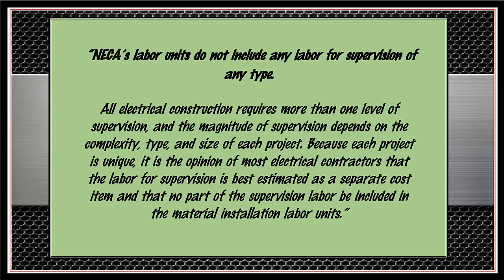Because each project is unique, it is the opinion of most electrical contractors that the labor for supervision is best estimated as a separate cost item and that no part of the supervision labor be included in the material installation labor units.